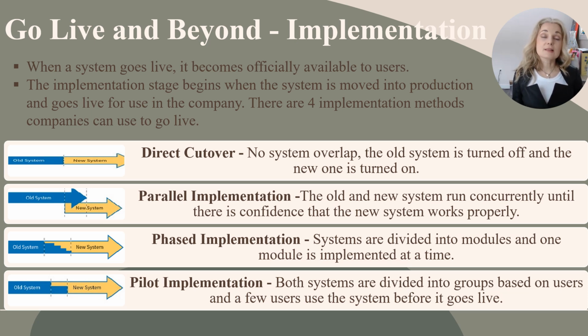Some time passes and we find that it works, then the production module might go online, or the supply chain. The key is that it's phased and only one module is introduced at a time, and all of the people who aren't within that module are utilizing the old system until their time to go live comes about.